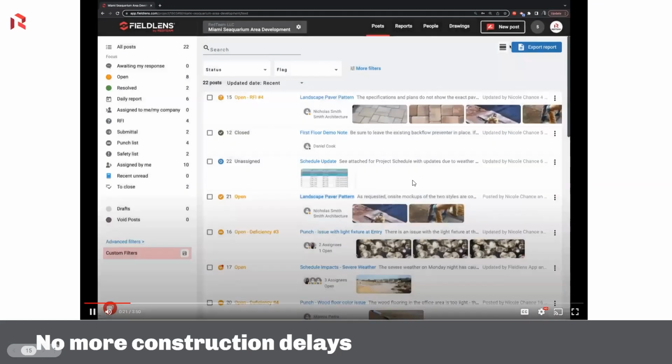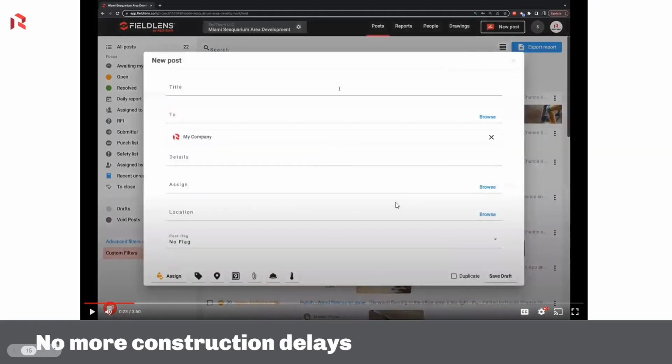So if you ever need to go back and answer for those, whether it's pushing out a schedule or maybe some liquidated damages at the end of the project, you can answer, okay, well, we had X amount of days under weather delays. That's some great evidence for hashing out those situations.